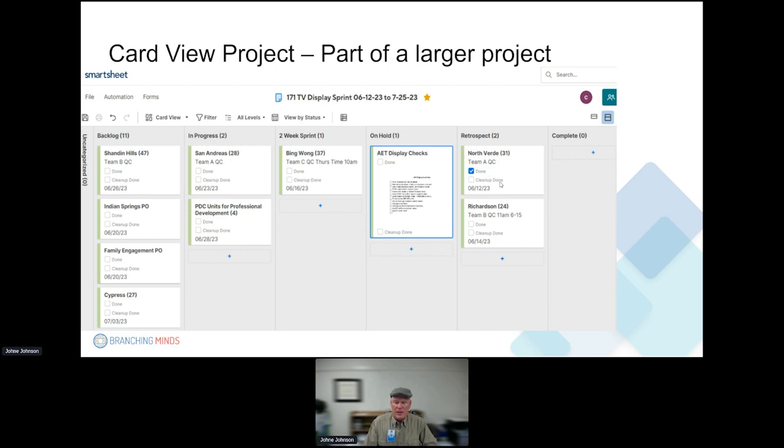And we had a problem where people weren't cleaning up all the trash. And so we just added it on here as another thing they have to check on. So the vendor, EKC, has to go out. They have to verify that it's been cleaned up before they can click on that, before it gets to the completed box. So that's how we take a bigger project, break it down into a smaller time box of how much I can get done in that time frame, and then work through them one at a time.